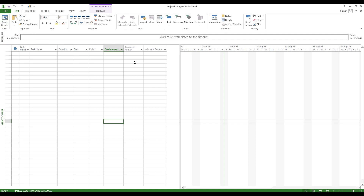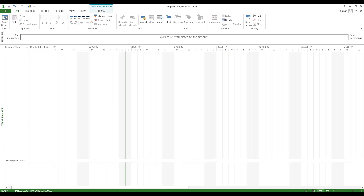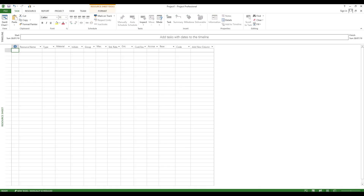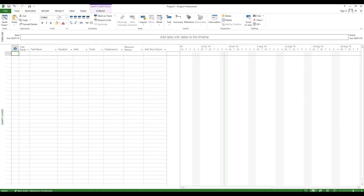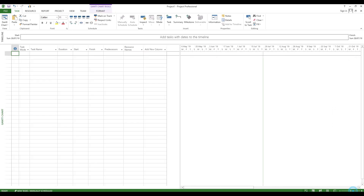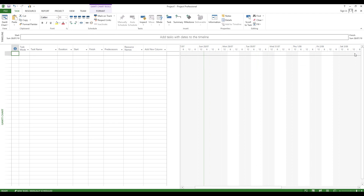The default view in Microsoft Project is the Gantt chart view — the left side is a task list and the right side is the Gantt chart, which shows task progress. In the status bar, you can switch between different views: team planner, resource sheet, Gantt chart view, and task list view. You can quickly zoom in and zoom out. Sometimes a project plan can be 2 or 3 years long, so the zoom in and zoom out feature makes navigation easier.